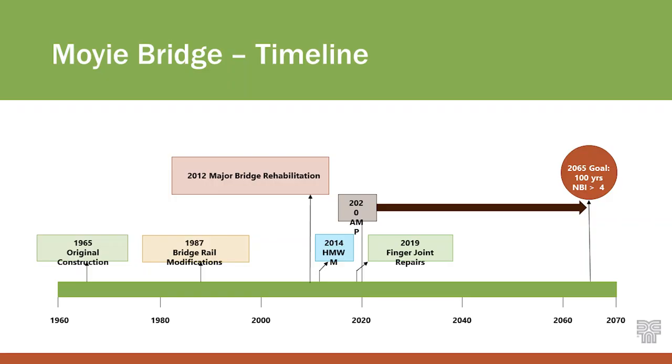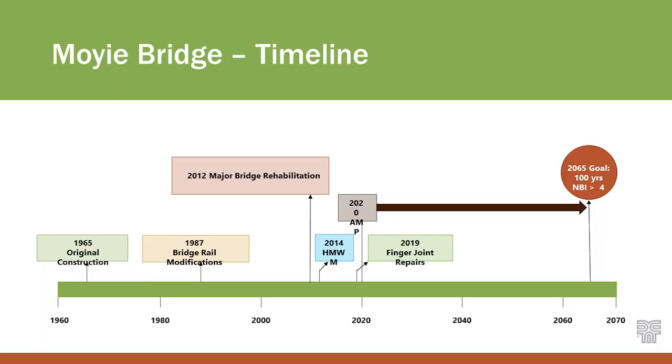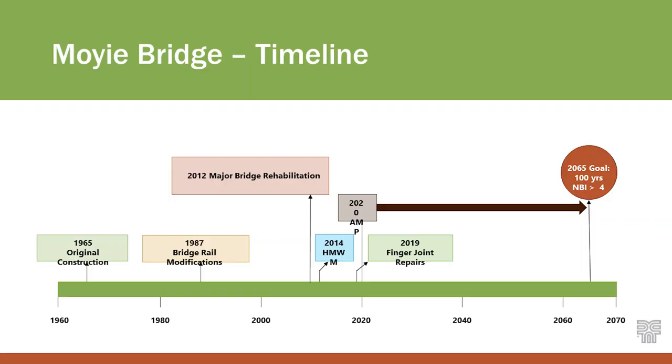Timeline of the bridge: it was originally constructed in 1965 and went through some minor retrofit work. I want to focus on the 2012 rehabilitation project that ITD put together. As part of that evaluation, they looked at the deck, did some non-destructive testing, and found that with some minor repairs they could continue using the deck if they installed a polymer concrete overlay, which they did. Another aspect of the work was the truss itself.